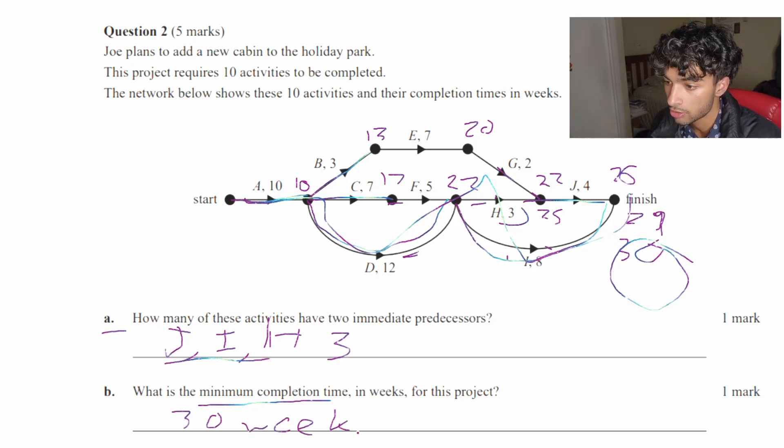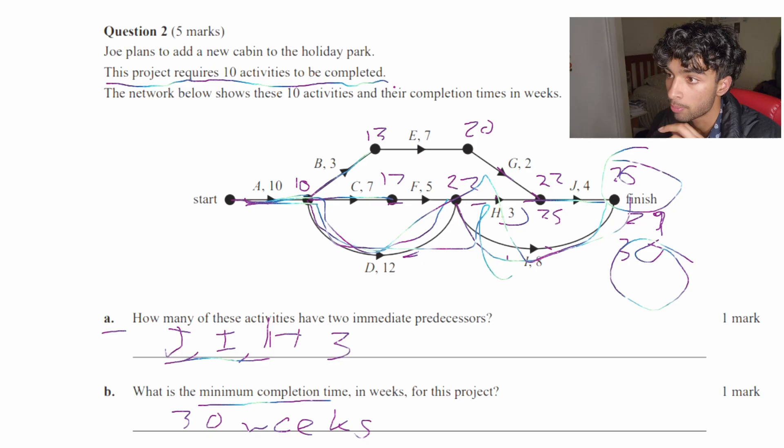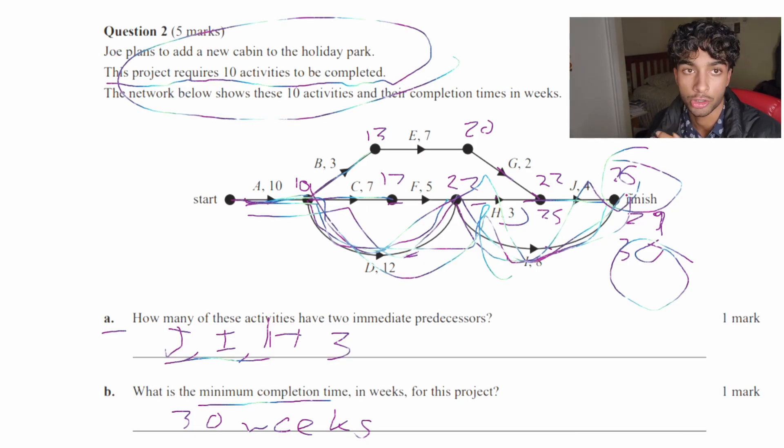So the minimum completion time is indeed 30 weeks. So that's not a mistake that people tend to get tripped up on is when they say minimum completion time, oh, that means it's 26. But no, you have to count for all the activities to be completed. Because as you can see in the question, it says this project requires 10 activities to be completed, which means all of it has to be completed. And the longest path is the minimum completion time.